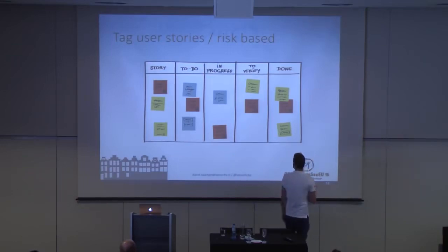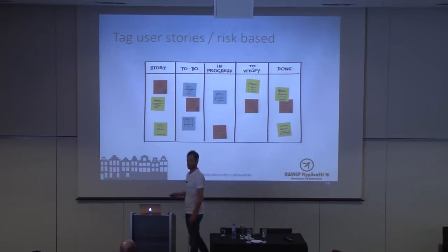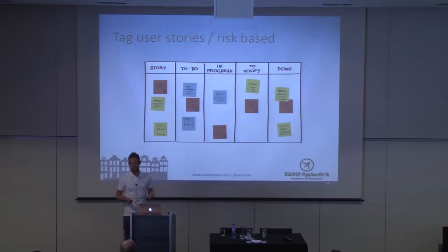So this actually worked pretty great. So we were able to get from 10 or 20 user stories to maybe 5, 6, or 7, which were really security relevant. There were sprints where we couldn't find any security relevant change, so they just got to go live without any additional assurance from us. So this is really great.